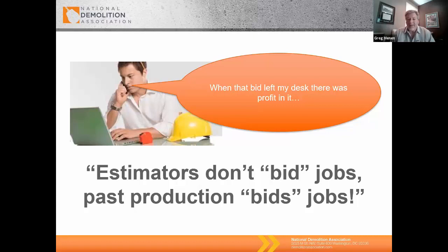In order to understand what the bid or the estimate and the efforts are going to entail, the best way we can do that is to learn from what we have done and completed in the past. So what we really want to do is draw information, or at a minimum start working with your company to talk to your superintendents, to anybody who's previously completed the work, so that we can understand how long something takes. In addition, probably the greatest source of information is to go back and find out what went wrong. By understanding what went wrong, we correct those mistakes for the future, and then we put together what we can actually do. There's a lot of factors included in that portion, and we'll touch base on a few of those as we go through, and how and why that makes a difference.